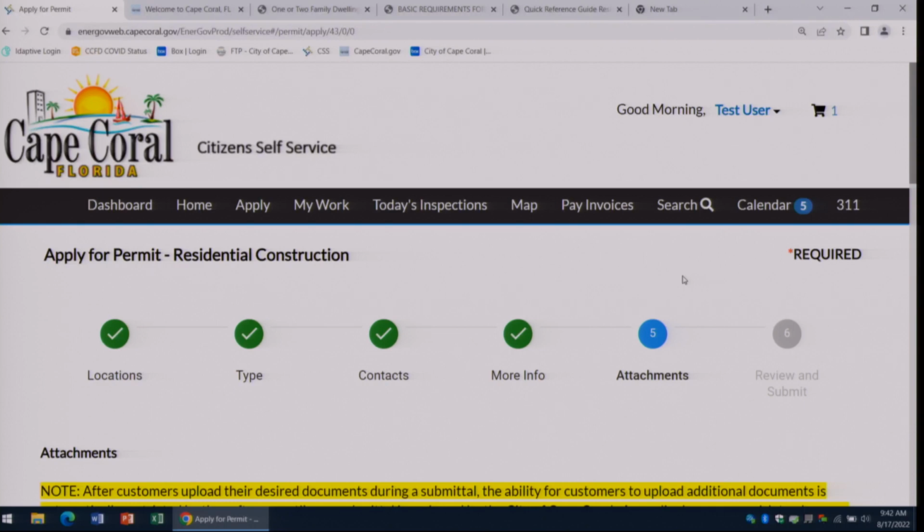Yes. Is there any benefit to using a third-party plan reviewer? Somewhat. So if you use a third-party plan reviewer, they should be comparing your plans to the building code, so they can go ahead and maybe work out any kinks in your building plans before our plans examiners see it. Because once it gets to our plans examiners, they're going to review it to the building code as well. A lot of rejections happen at that point because some things aren't up to code. So your third-party private provider could eliminate some of those rejections that might happen down the road.